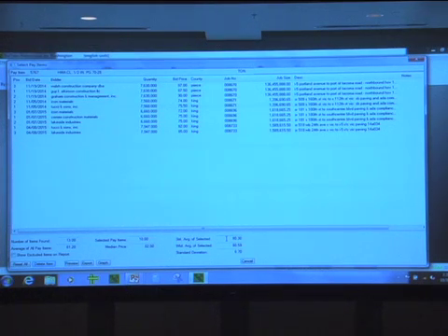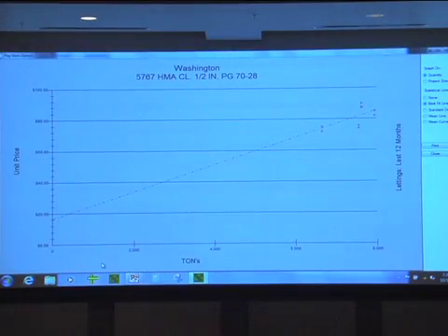Now I'm feeling pretty good about that price, and that was kind of the artsy bit that Blane had talked about earlier. If you want to have it proved to you, or you got to prove it to somebody, we got a scientific bit here that we can show a graph, and it'll show a trend line of what the predicted cost should be, and we can even throw a standard deviation around that, and we can see that those costs are all falling in or right near that line. So that's probably a pretty good estimate for what that's going to cost per ton.